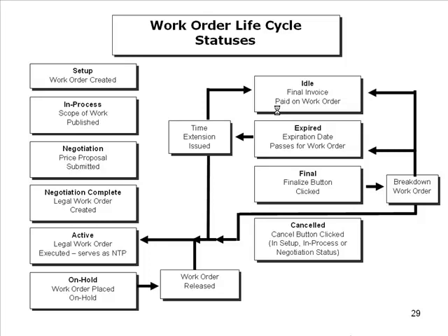The last status there on the right is the canceled status. Once the cancel button has been clicked, the status will change to canceled. And that's if a work order is in setup, in process, or negotiation statuses.